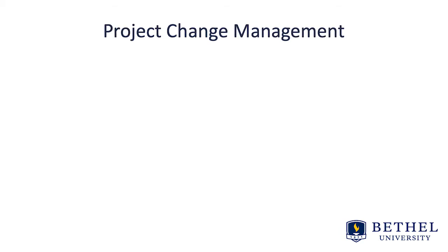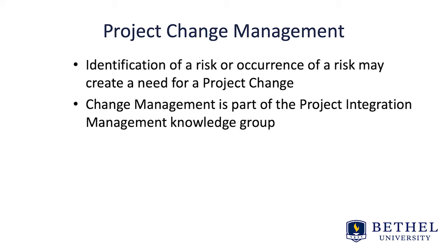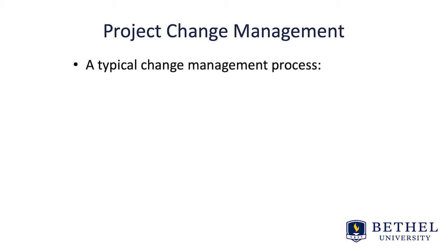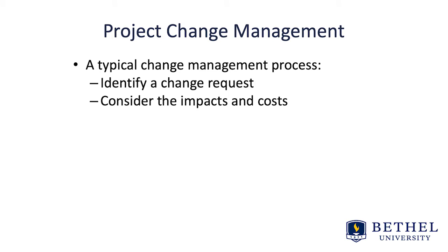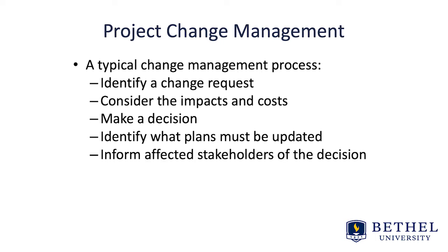Project change management. Identification of a risk or occurrence of a risk may create a need for a project change. Change management is part of the project integration management knowledge group. A typical change management process includes identifying the change request, considering the impacts and cost, making a decision, identifying what plans must be updated, informing affected stakeholders of the decision, and proceeding with dealing with the change.